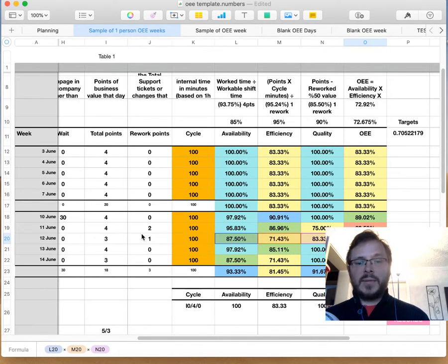For example, one of the ways we try and do it is line up rework change requests, try and do 2 or 3 in quick succession, because sometimes they do take time to work out and factor in, but sometimes they are much quicker. They may take half as long as the original work, or they may be even quicker, and you can get through quite a few of those, which can boost your numbers up. Even though you're only getting half the value for them, if you can get through a lot more, they're more valuable than, say, doing 1 request, 1 fix a day. That can affect your numbers a bit more, takes you away from the more valuable work.